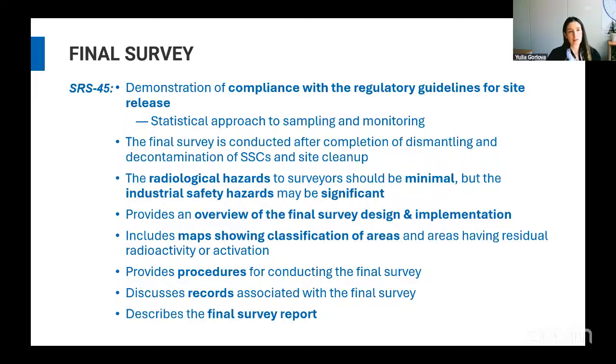Final survey is the final document that is prepared when the works are completed. We do once again the radiological survey that shows and proves to the regulator that we can release the site. If that's reached, fine. If not reached, then, as I was showing yesterday in the scheme, we should get back to earlier phases and see whether we can do some extra decommissioning works on decontamination or something else, or we can revise the end state, for example.